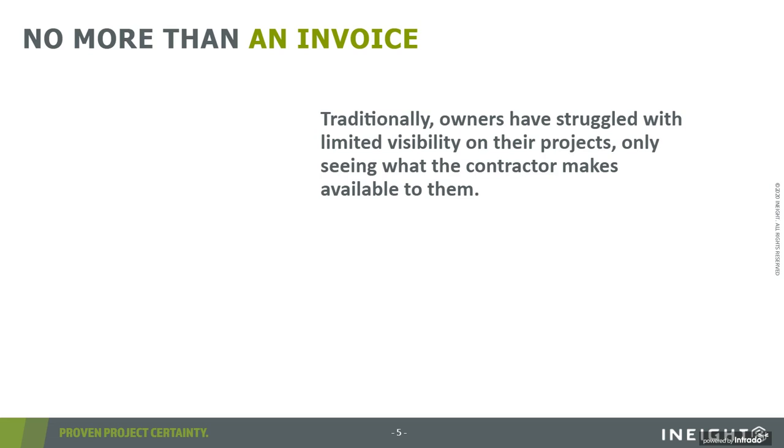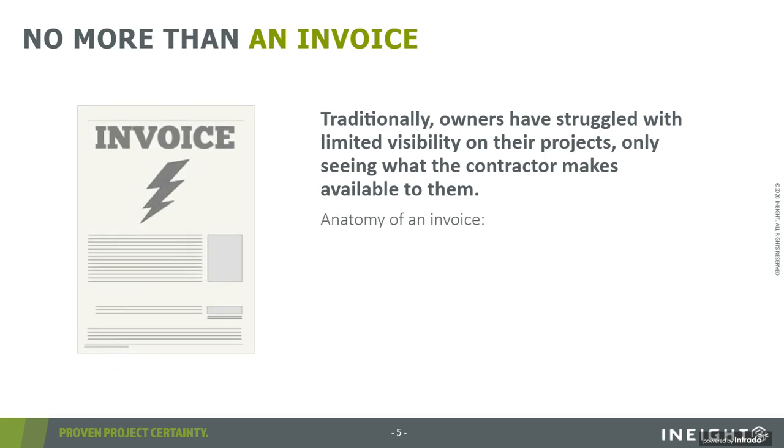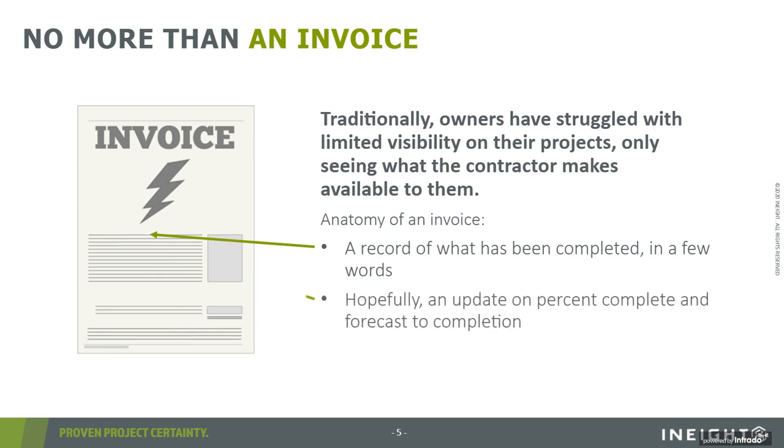And what we have to rely on is, at the end of the day, a piece of paper that is sent to us on a weekly, bi-weekly, or monthly schedule, whatever has been determined for our project. And hopefully that piece of paper has some sort of record of what's been completed. Maybe it's a few words, maybe a few sentences, maybe a couple of line items based on a schedule of values that we put together with the contractor.